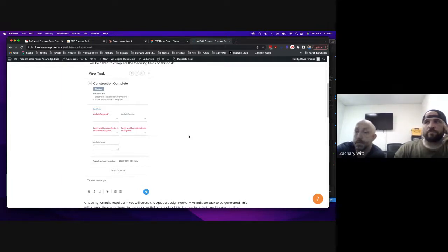Okay. And so if you're not doing however many you're installing, I know you guys know this, but if you're not checking off construction complete on the amount that you're installing that day, you're going to be in a hole pretty quick. So don't let it languish. Like, this should be one of the top priorities. In fact, on your top 10, this should be your debrief and construction complete should be in the top 10 things that you do every day. If you got 5 crews, you need to be checking off 8 jobs in this queue, or else you're going to end up with a lot of wait time on customers.